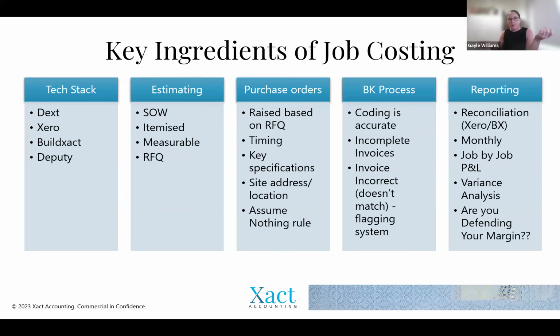And you haven't raised a PO because it's a small amount, like your tip fees, or sometimes your labour, there's no matching back to say, well, I've quoted for this much, I'm paying payroll over in Xero, I don't really have a connection between what I'm actually incurring versus what I've quoted for. And so you don't realise that there might be gaps. While your job management system might be telling you that your job's doing really well, you can have a whole bunch of other costs that have run through, haven't been allocated to a job, and are sitting and paid through Xero or MYOB that you're unaware of. So you actually don't know where or how you've lost money on a job or made money on a job.